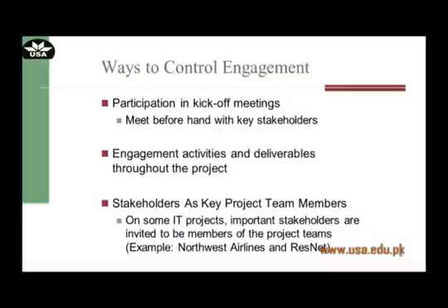Number one thing that we can do in order to have a healthy relationship is that we need to have participation of all of these stakeholders. In all the planning phases, in all the planning and implementation phases, we need to have the representatives of all of these stakeholders that have huge power and influence on that very project. If we are not involving them in the discussion, they would create problems in the implementation phase. So from the political point of view, it is also very important to have their feedback or suggestions incorporated into the overall planning process.